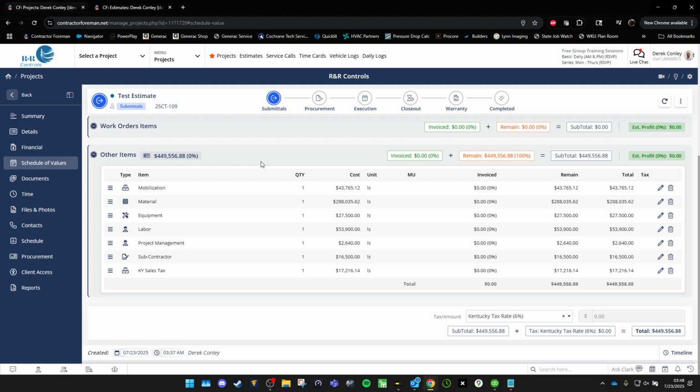If you were wanting to go ahead and invoice so you could go ahead and order a big chunk of material, here's your schedule of values. I understand that sometimes you're only going to send one or two invoices. The schedule of values does not take long to set up and expedites invoicing tenfold because it lines everything up the way you want it to be invoiced.